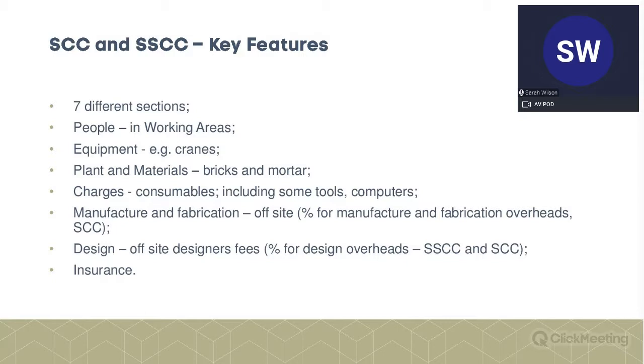And then finally, the insurance one. I think you should pretty much ignore this, because it's not to do with the cost of insurance. It is quite misleading, which is why I said just ignore it. Your cost of insurance is dealt with in your fee percentage, so just be careful about that. This element relates to where there is an insurance claim, and how the money is paid in relation to monies paid on an insurance claim.